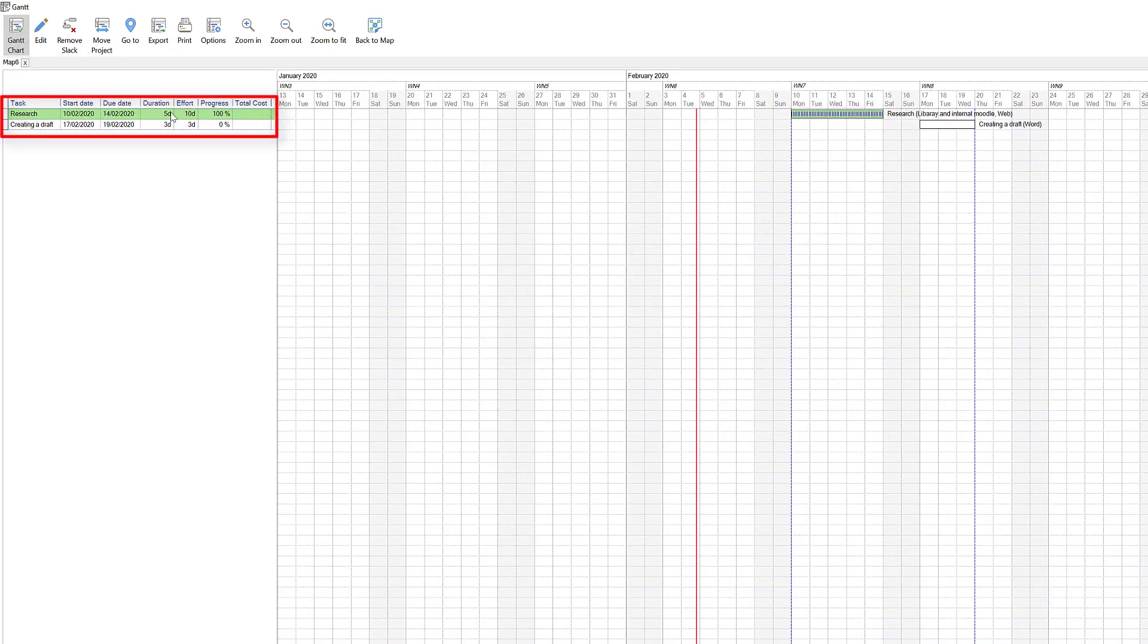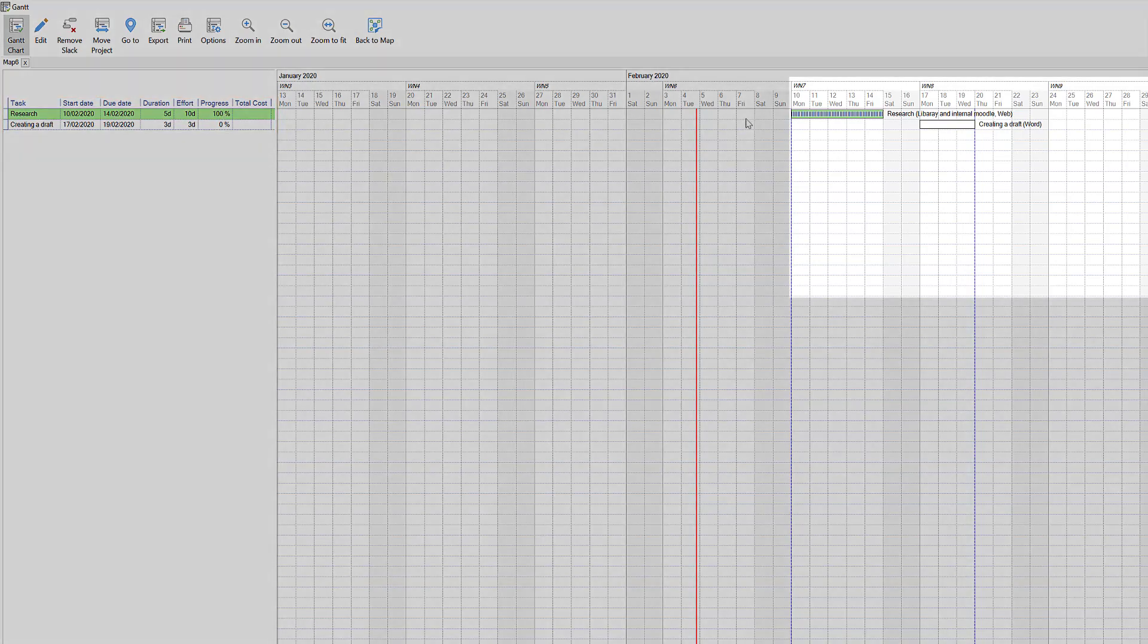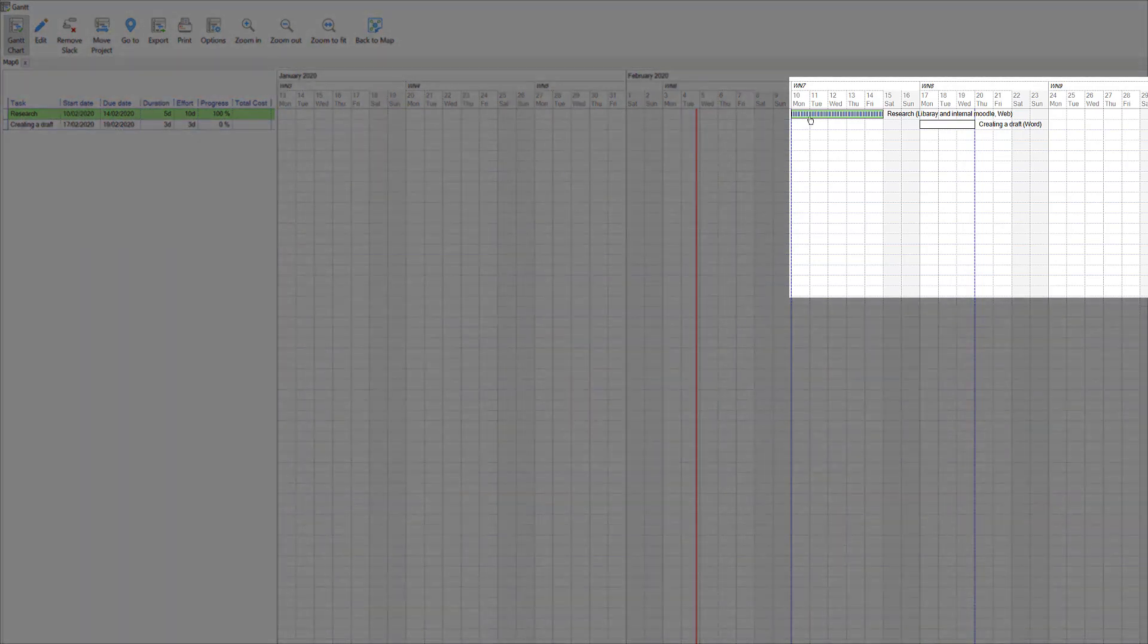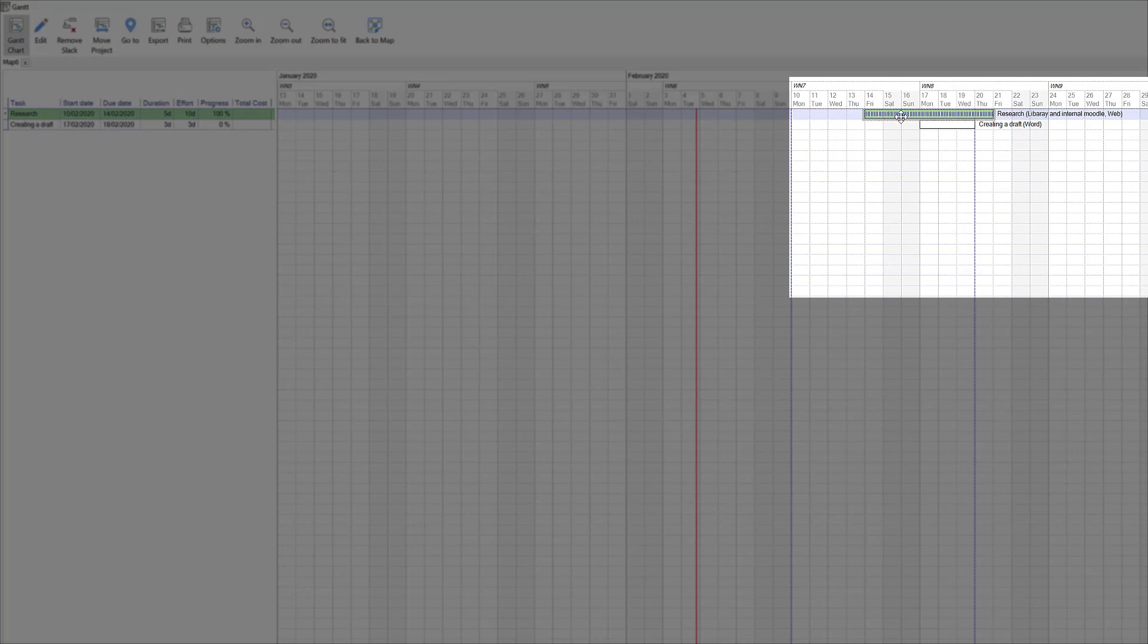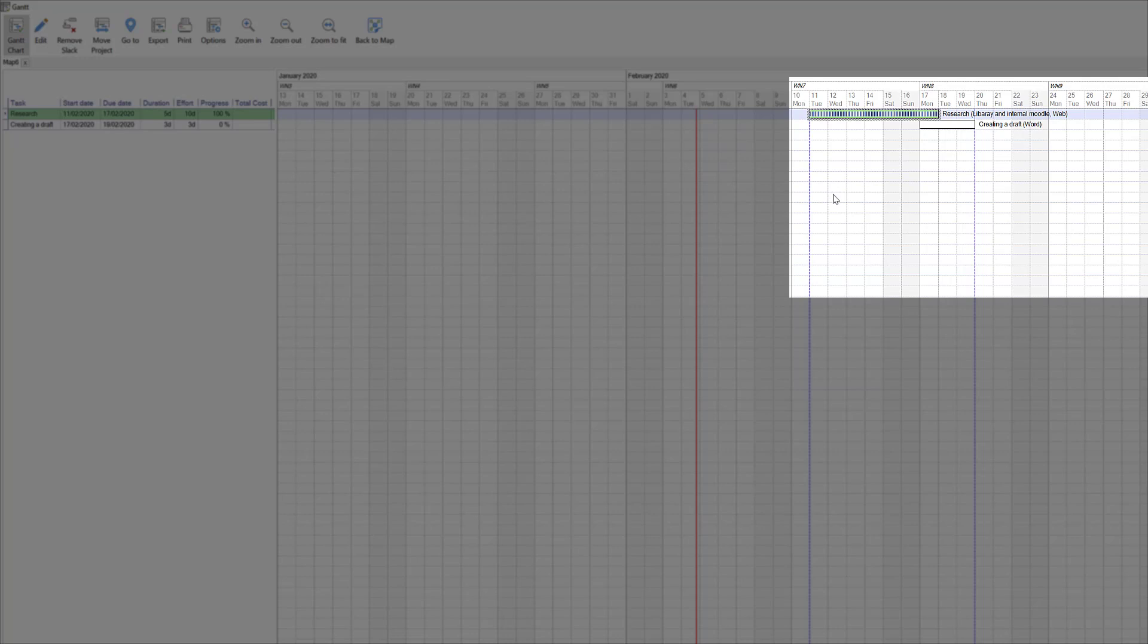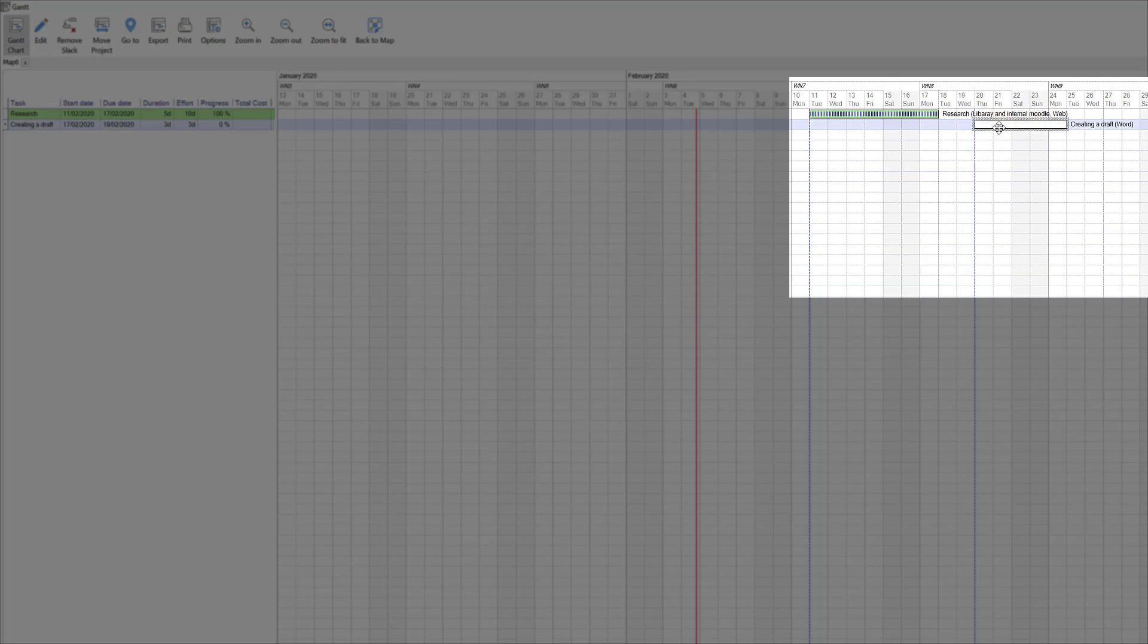Five days duration, progress needs to be done 100%. Come along here, you can see the 5 days. If I hold the left button I can drag that. So you don't start on Monday, you're actually going to start on Tuesday - something came up, so you can push that along. Then create the draft, you might decide I'm going to leave a few days and start that a bit later.